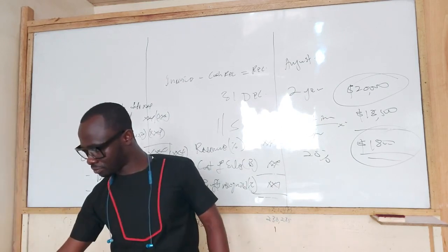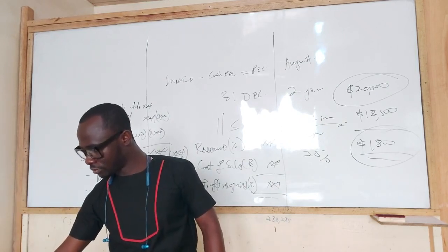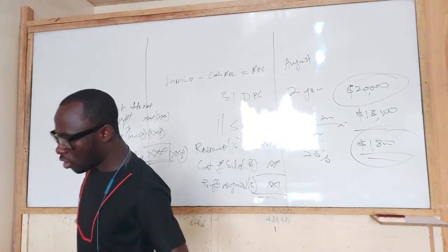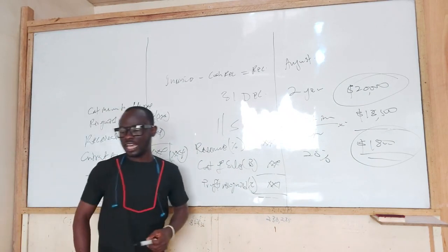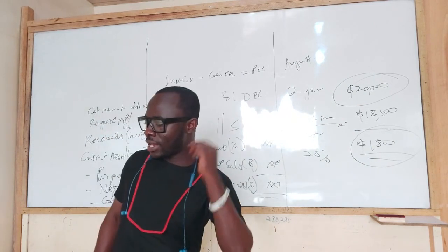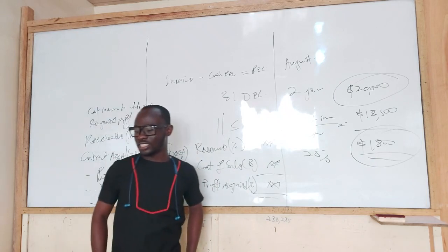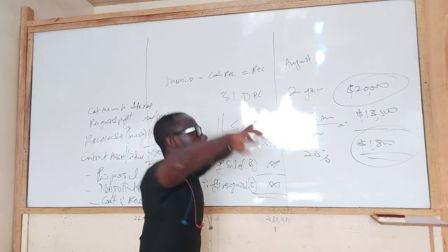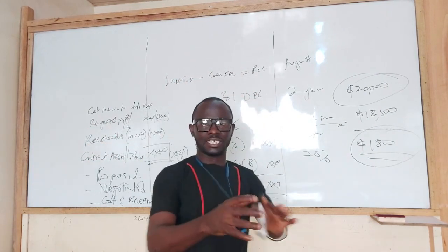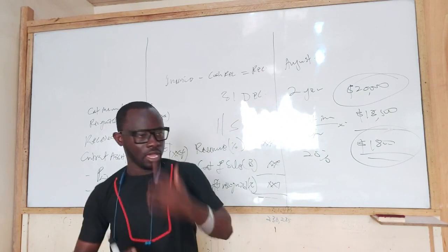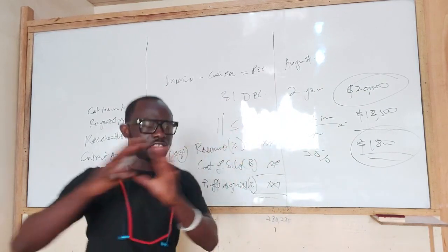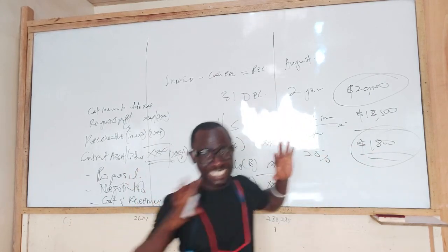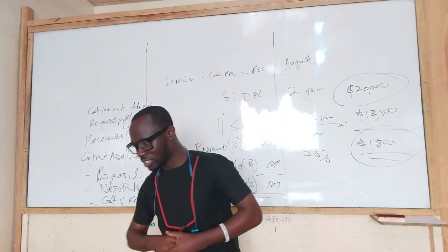Note also, a group of contracts, whether with a single customer or with several customers, should be treated as a single construction contract when a group of contracts is negotiated as a single package. It goes back to what I said. So when we have a group of contracts, supply desks, supply computers, supply books, and even though these are three separate things, they were all negotiated and agreed upon in a single package, then we will treat that as what?